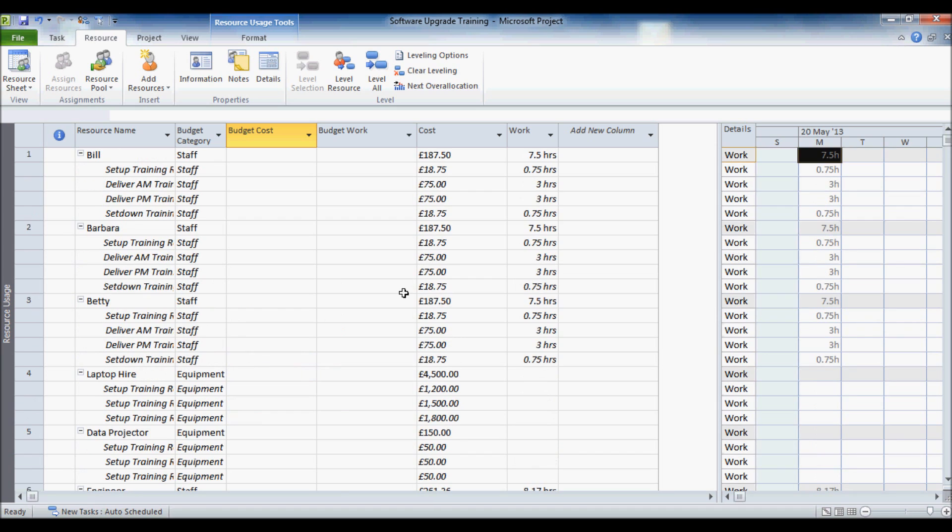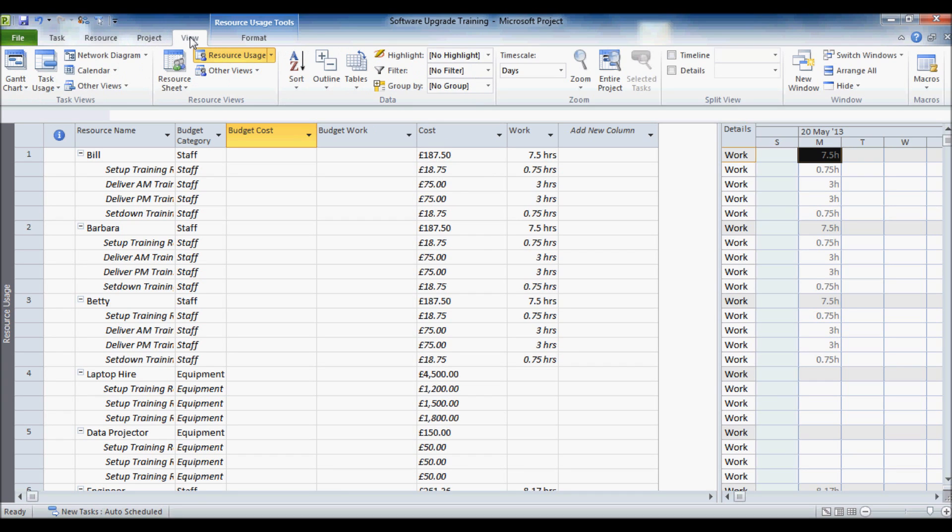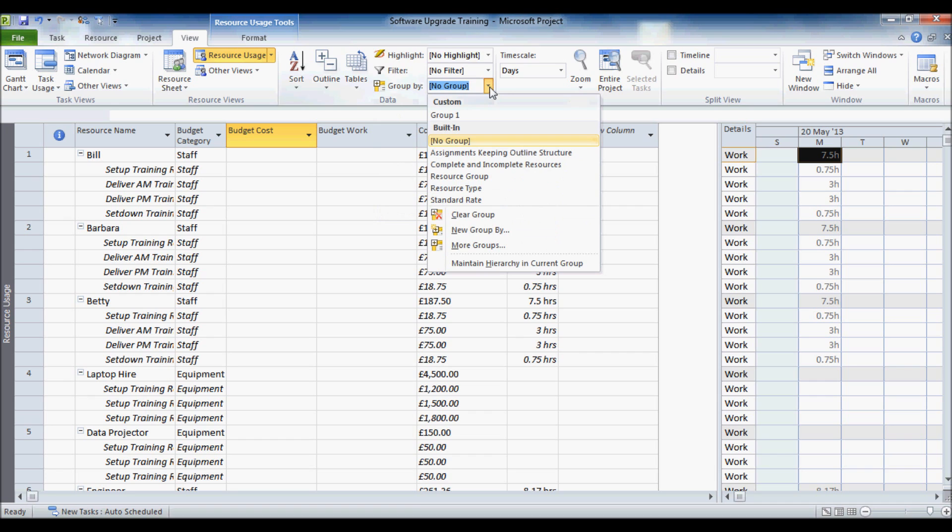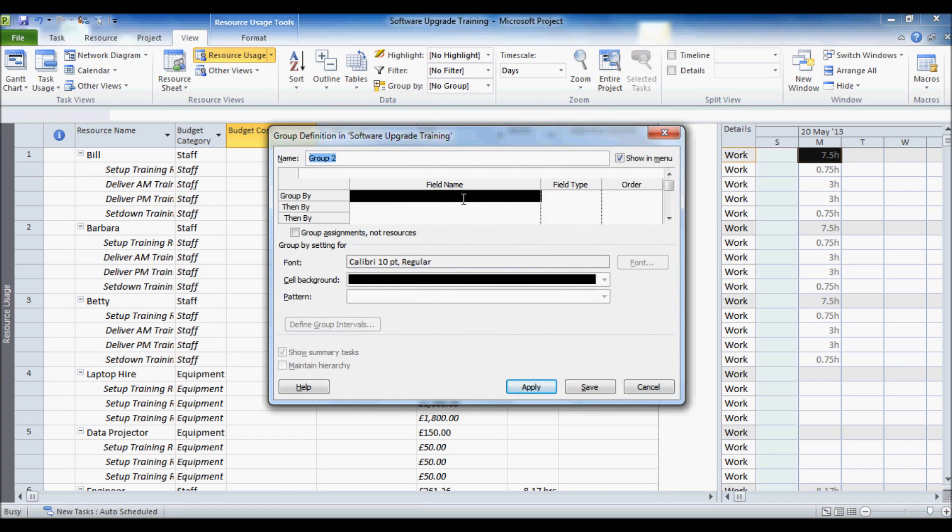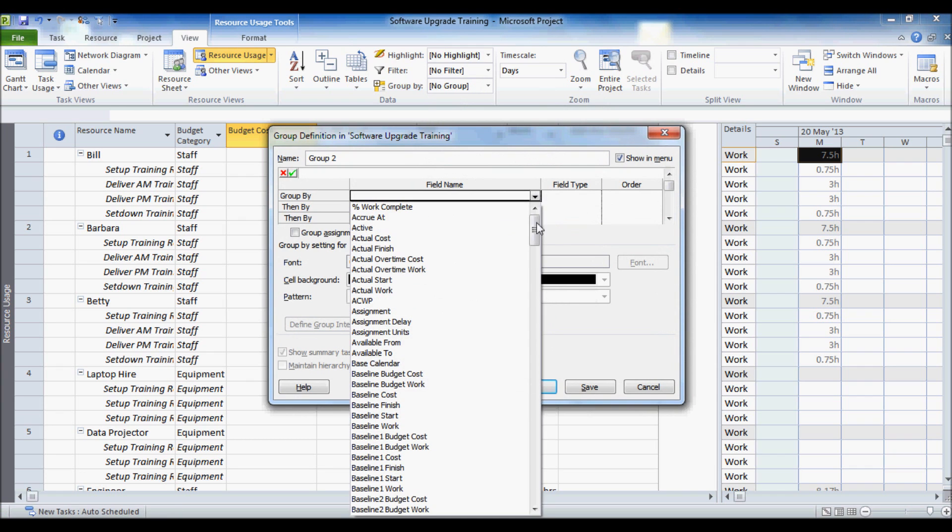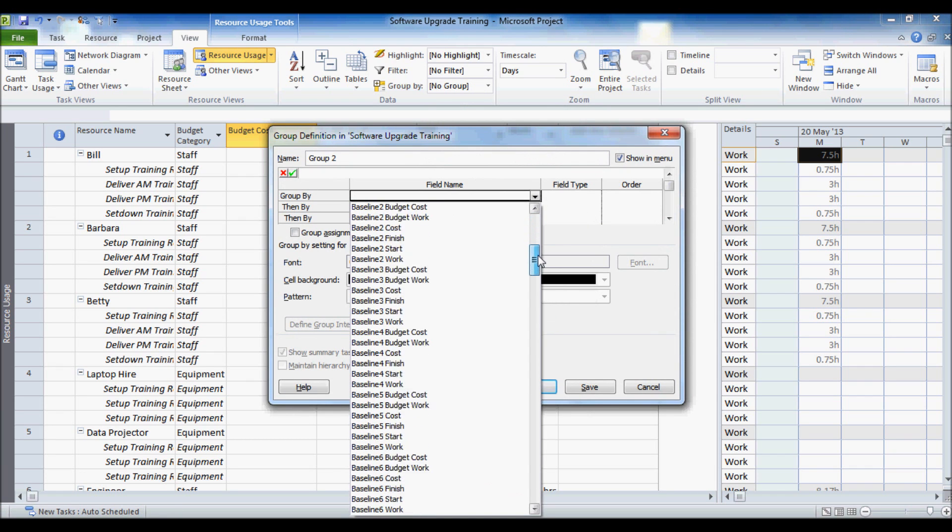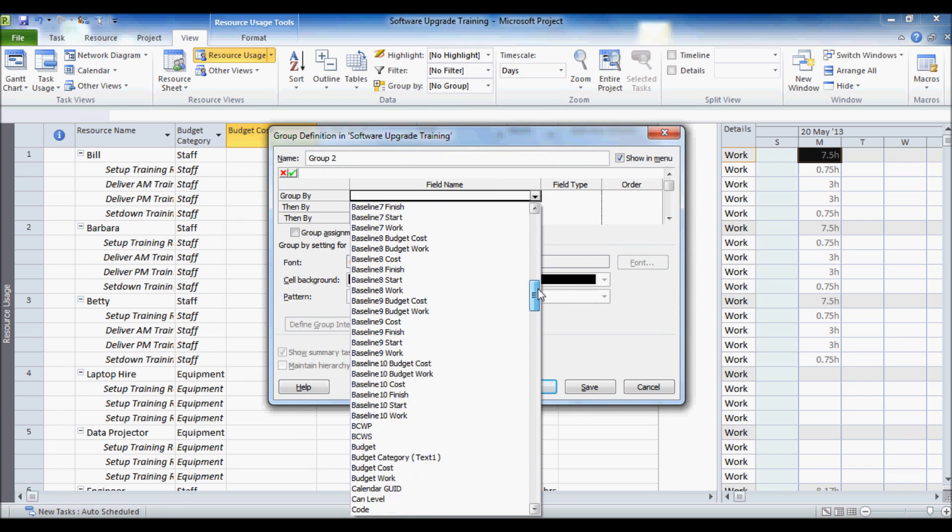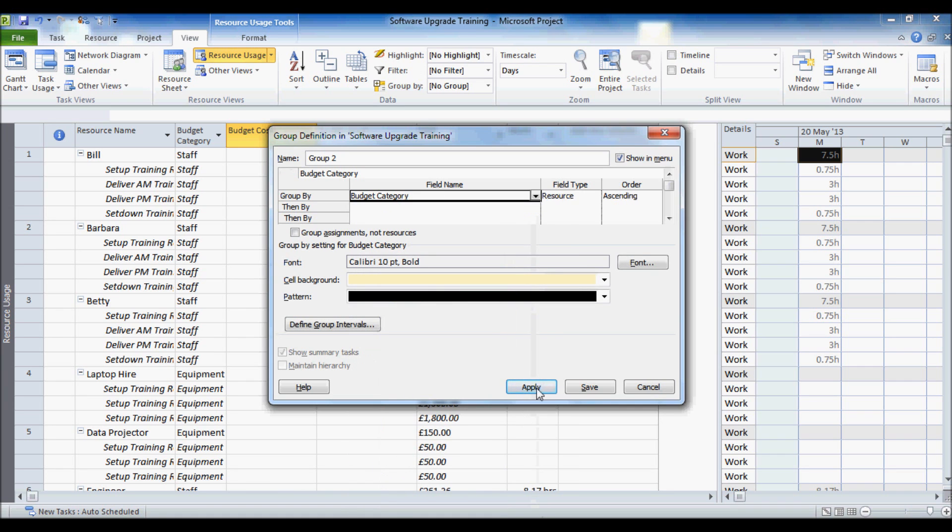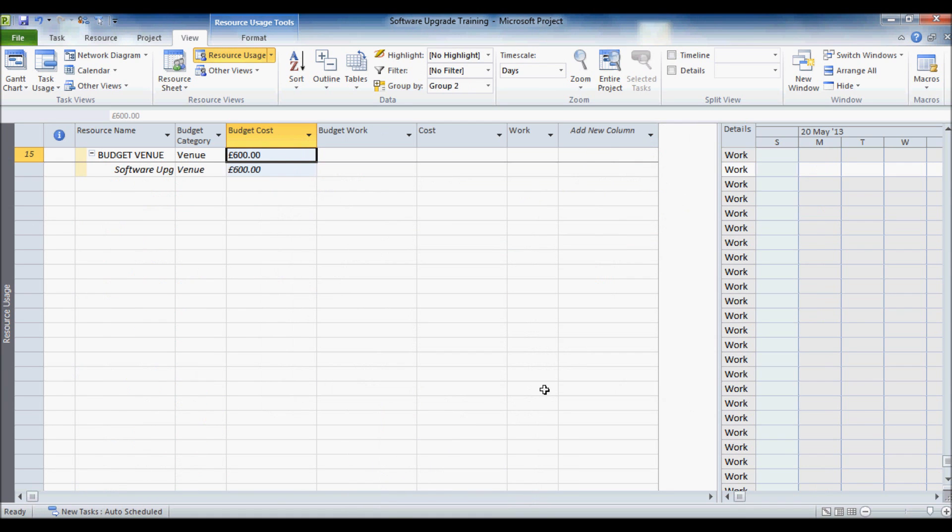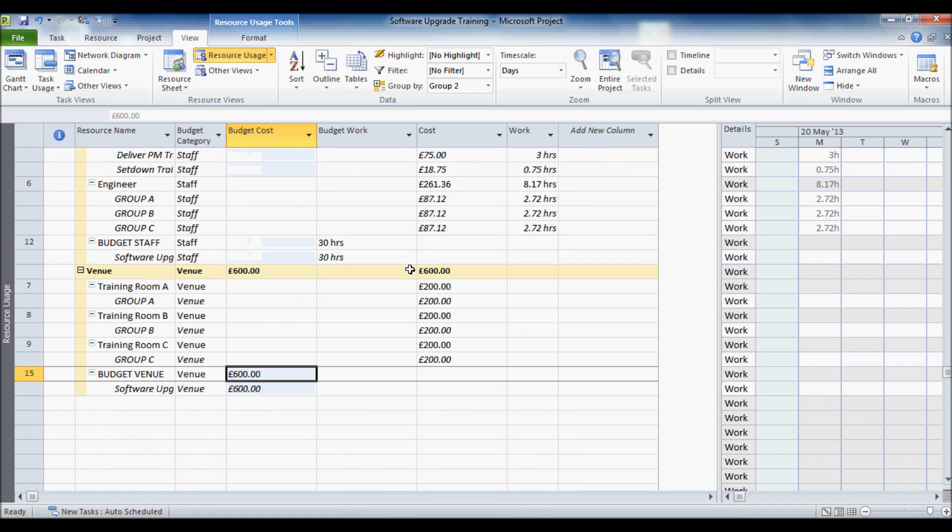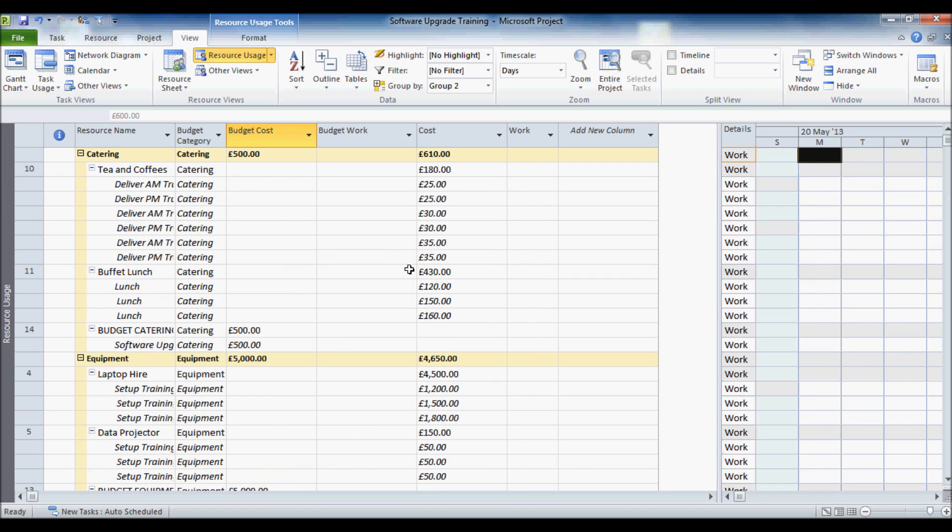Now what I want to be able to do is group these costs and works by that little budget category field that I created earlier on. So I am going to go to my view tab and I am going to go to this group by drop down. I am going to say new group by. And then I want to choose the field that I previously created. So somewhere down here. Budget category text one. Click on apply. And what that has done is basically grouped the different resources under the budget category that I have given.